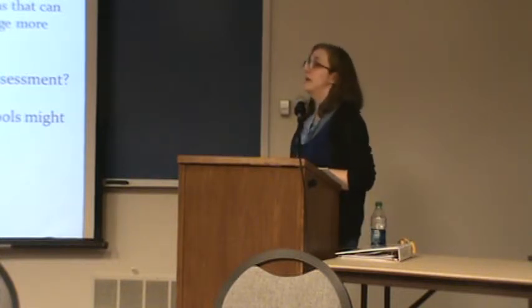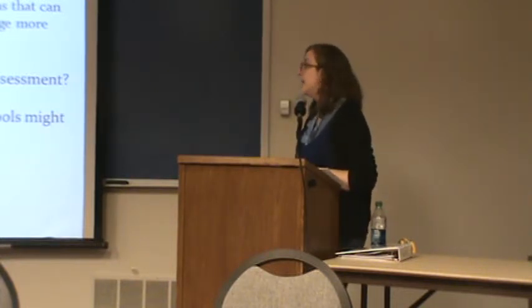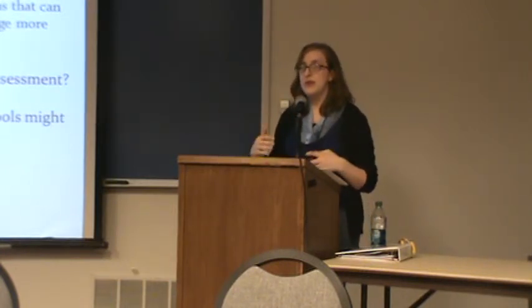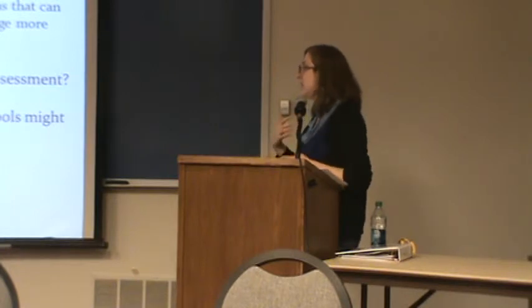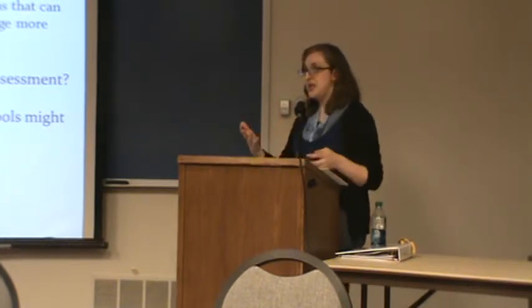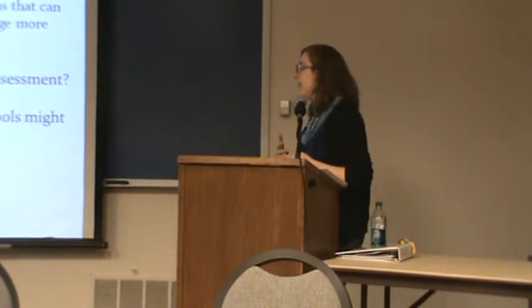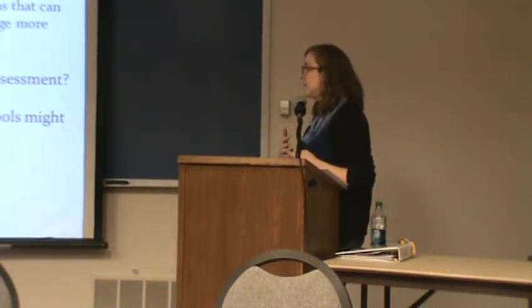Circulation figures. Yeah, this could be a huge help in identifying success. You could set up milestones for yourself, like 10% of this online services traffic comes from external IPs, or the laptops got checked out X number of times in a month, and then they doubled the next month. So you can set up outcomes that way.